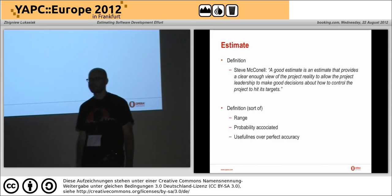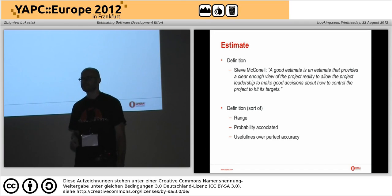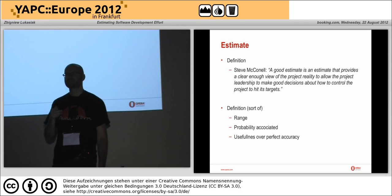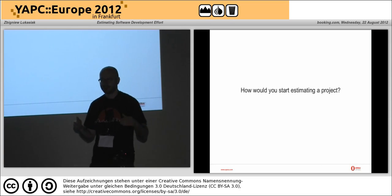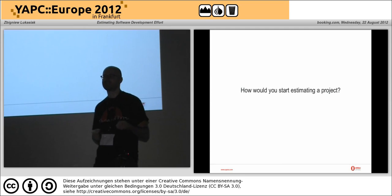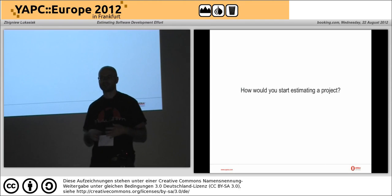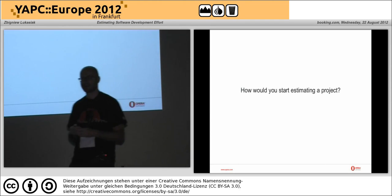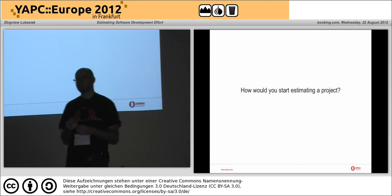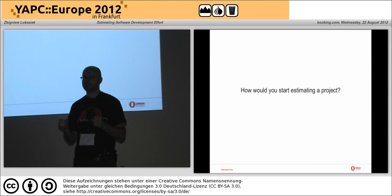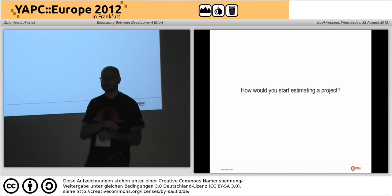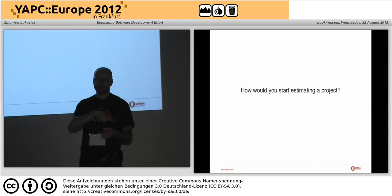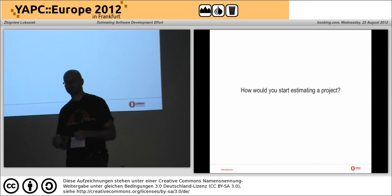How would you start estimating a project? Based on previous experience with a similar project - you compare it to your current project and say 'this is about twice as much.' The comparison between the current project and the previous one is judgment, while the previous project data is more like counting.